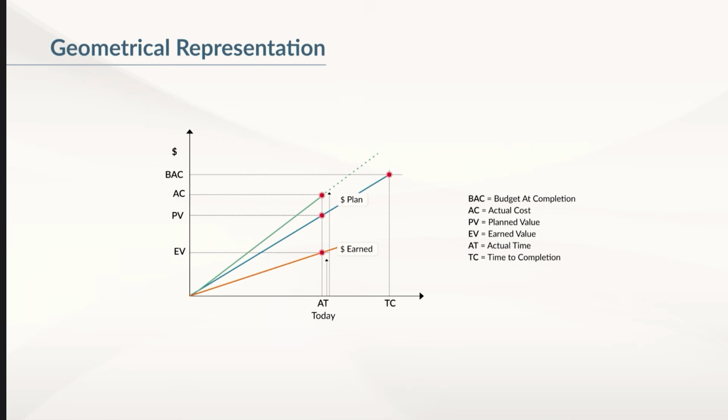During the planning phase, you created a project plan including a Gantt chart and all tasks. You also created a project budget per week or per month for the duration of the project, and if you convert this budget into total expenses per week, you have created a planned value of the project, PV for short.